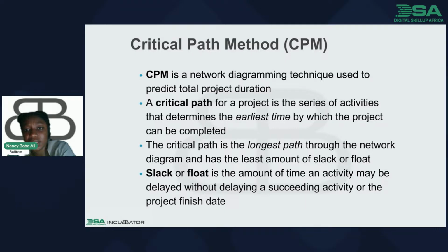You just have to make sure that the method is something that you can predict, that the flow is constant, and that it is not something that will mess up the project, which hence introduces slack or float. Sorry, my hair. Slack or float is the amount of time an activity can be delayed without delaying a succeeding activity or the project finish date. So yeah, that's it for CPM.